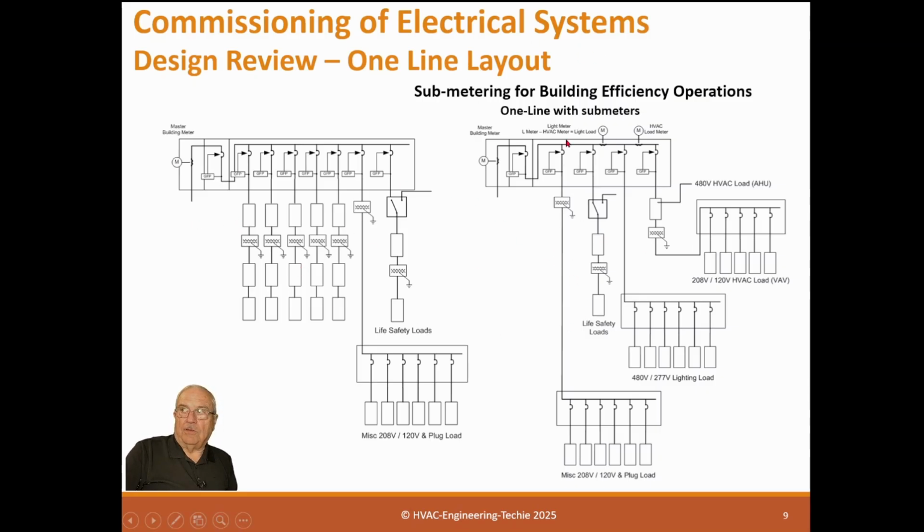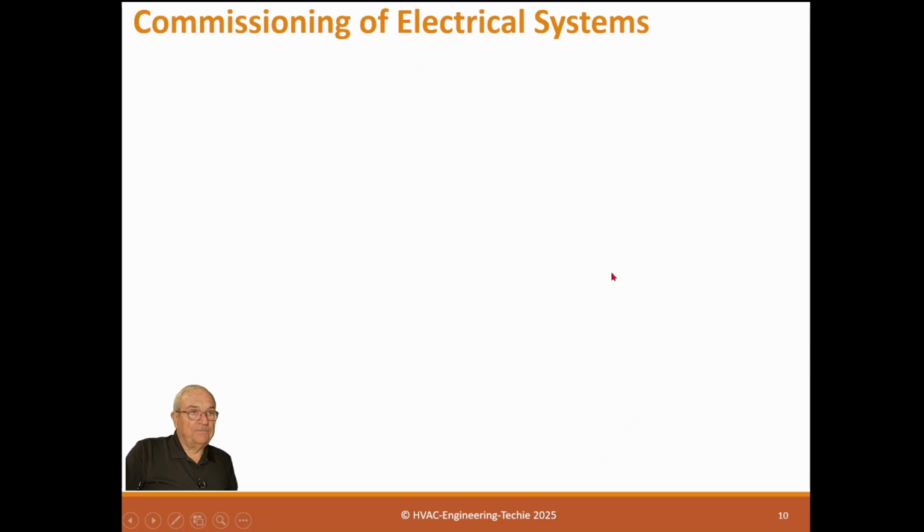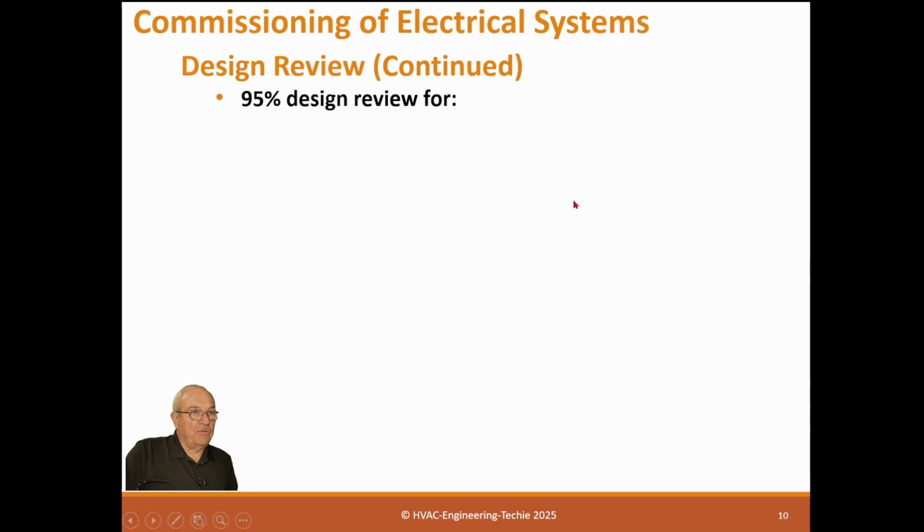Now, you can do the metering many, many different ways, but the time to approach this is at 65% before the engineer spends a lot of time laying out integrated panels when we need segregated panels. So that's really important. All right, design review, 95% review.